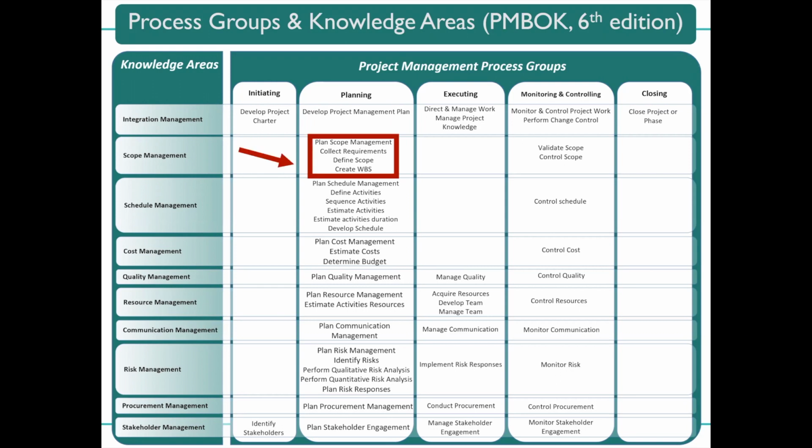You'll see the creation of the work breakdown structure takes place in the planning phase. The project scope statement should definitely be referenced during the decomposition of work. The scope statement describes the project deliverables and work required to create those deliverables.